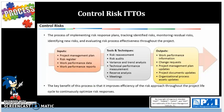Next we'll be going over the inputs, tools, techniques, and outputs — ITTOs — for control risk. We have the project management plan as an input, then the risk register which is an output from the identify risk process. Then we have work performance data, which includes raw observations such as deliverable status, schedule progress, and cost incurred.